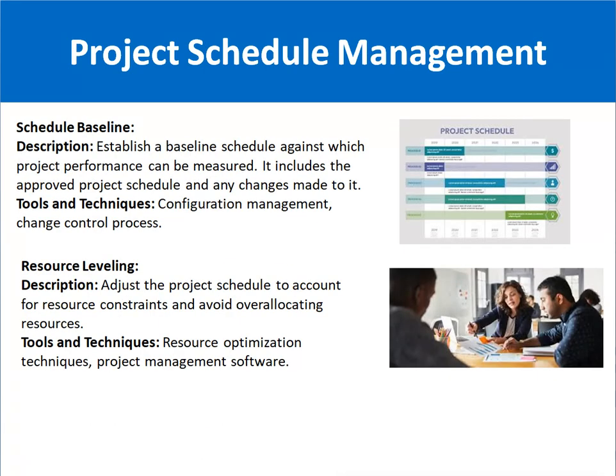Baseline means to establish a baseline schedule against which the project performance can be measured. For example, the project schedule says that in the first month you have to complete the first module, in the second month you have to complete the second module. So the baseline concept means that you can measure the performance of the project against the schedule baseline. Once the project schedule has been made, you can baseline it. That means it will become a baseline for the measurement of the performance of the project.